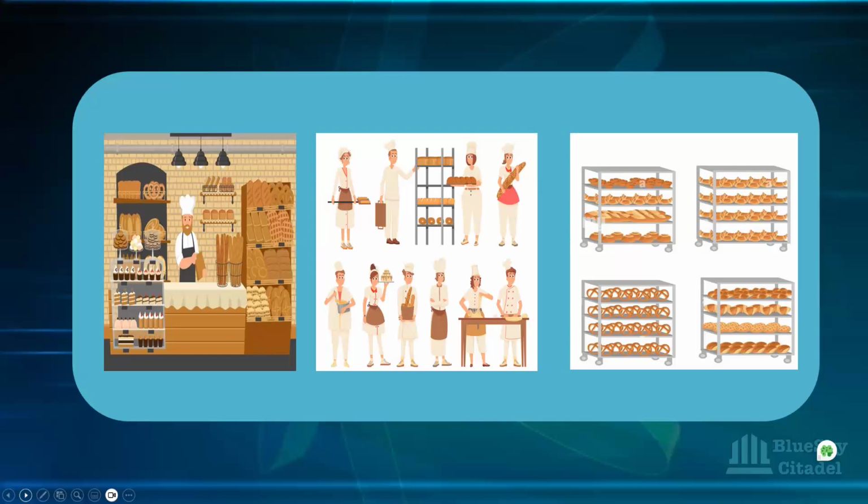I said earlier that in the case of the bakery, if the owner of the bakery knows on time that they still need that 20 trolley output because maybe there's a critical thing that needs to be done, he will go hiring, isn't it? He will get temporary staff to cover the two people that are not there. So in a situation where maybe you have a release coming and you need those people to be there, you can go resource borrowing. You can go to another team and get somebody that knows about your project.